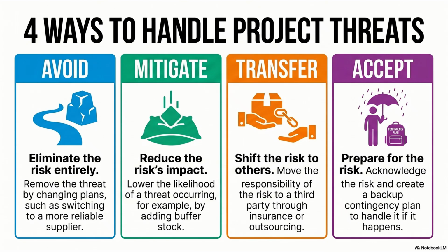The second is mitigate. Mitigate means reducing either the likelihood of the risk happening or reducing its impact if it does happen. For example, adding buffer stock or extra time in the schedule can reduce the effect of possible disruptions. In many projects, mitigation is one of the most common strategies used.